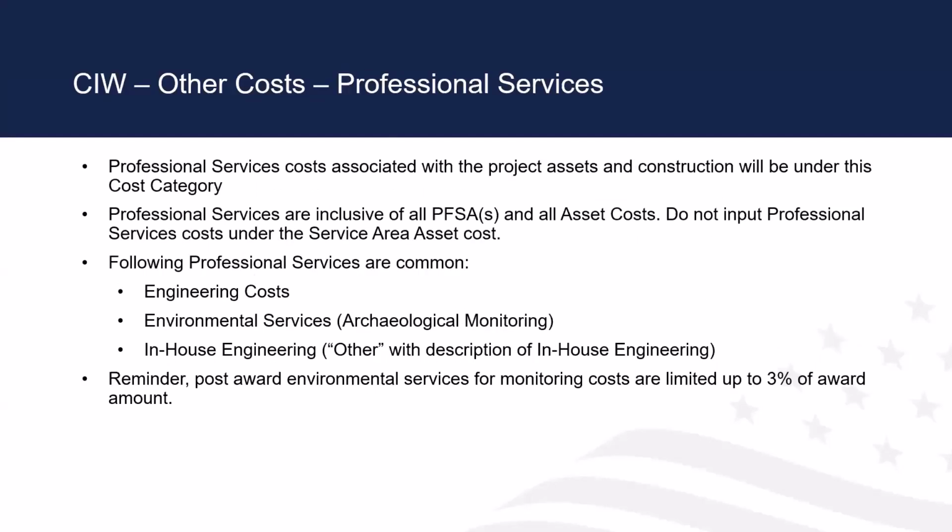Professional services, costs associated with the project assets and construction are under this category. They're inclusive of all PFSAs, and all asset costs, so don't put those professional services under the service area asset cost.